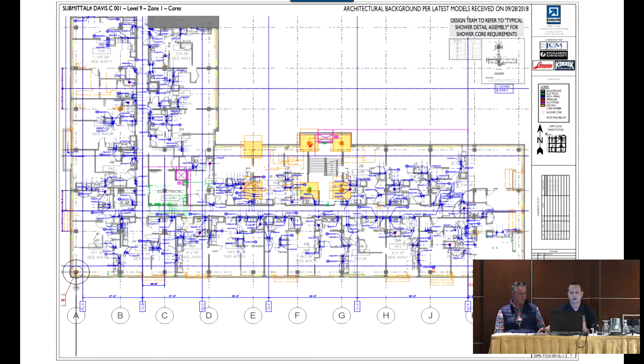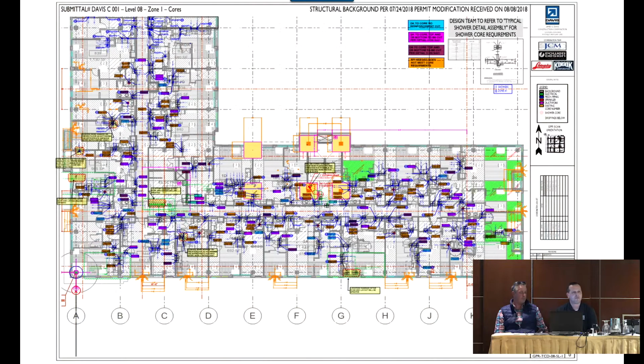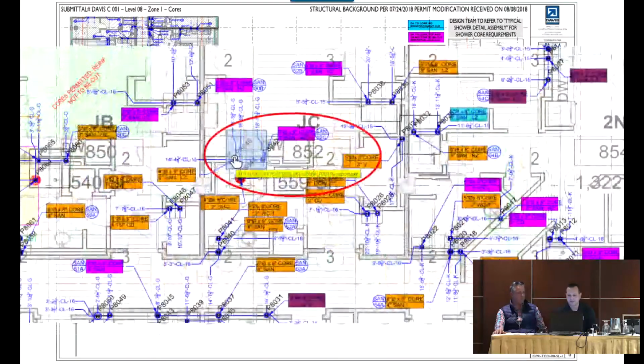So here's a sample of our submission that we initially put together within my group in operations. It then goes to the field where the layout engineers perform the GPR in-house, and then they perform an in-house review as well prior to submitting to the structural engineer. So we performed the first pass based on what we've seen, and this is a close-up of it.